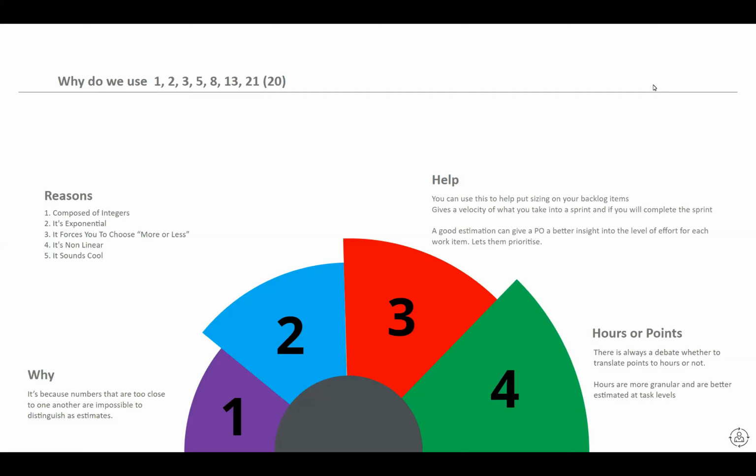There was another question around when do we do this exercise? And actually this exercise can be done throughout the sprint. So when do I do story pointing? I know a lot of you probably do it in planning, or you have a separate ceremony set up as planning poker. But actually you can do this whenever you want. I would encourage you to do this at least once a sprint, if not twice. I've worked in teams where they've done it probably once every other day, constantly refining the backlog. It was done quite a lot with Kanban teams where they are constantly refining, cleaning, putting work in progress limits in. So you can do this exercise whenever you want.